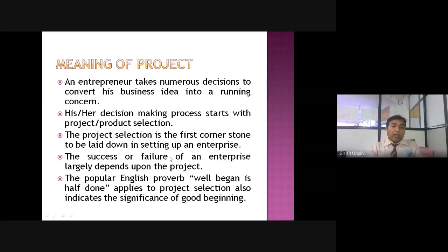That is the reason when we are selecting a project, we should thoroughly understand the different aspects involved in the selection of the project. For example, raw material. If there is a constraint on the raw material, such projects are very risky, or if raw materials are regulated by government agencies, again there is a risk involved. If you are dependent on other countries for raw material, again it's risky because governments and policies will change.